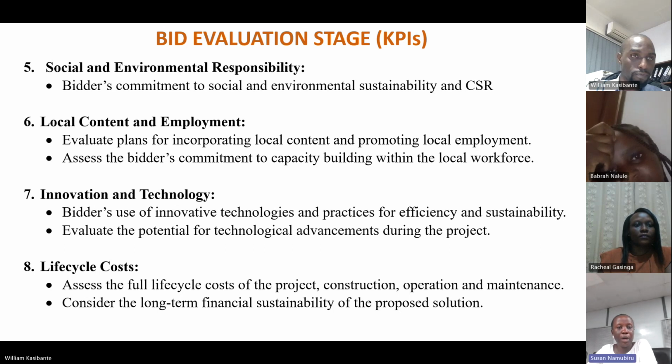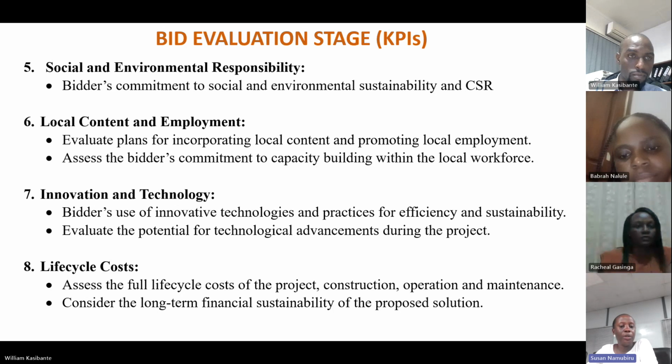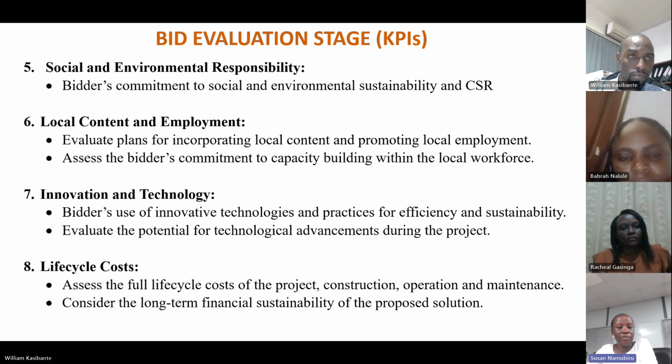Thank you very much, William. To continue with the bid evaluation stages, we looked at the commitment of the bidders to social and environmental sustainability. We also looked at the commitment of the bidder to employ the local citizens. We also looked at the bidder's advancement of technology during the project. We looked at the ability of the bidder to sustain the project financially.